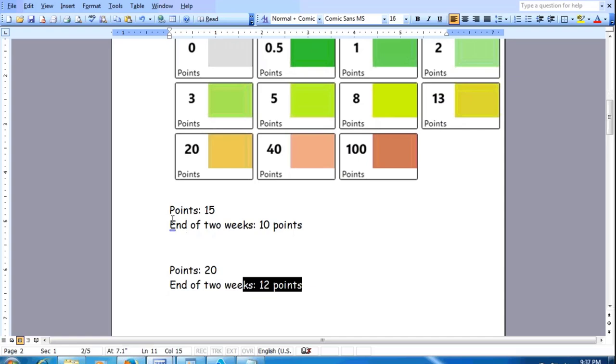That's why, in the initial sprints, sprint one and sprint two, there is going to be a problem, because you don't know what your team strength is. But definitely in the third sprint, you know what your team strength is. That way you are going to plan accordingly in sprint three. I'm going to plan maybe 12 points only. Why should I plan 20 points and then not accomplish them? Because if you do the estimation and planning like this, it always has an impact, because management is always looking at these numbers, and they are under the impression that the planning is not done properly, the estimation is not done properly. Does that make sense? Or any questions?